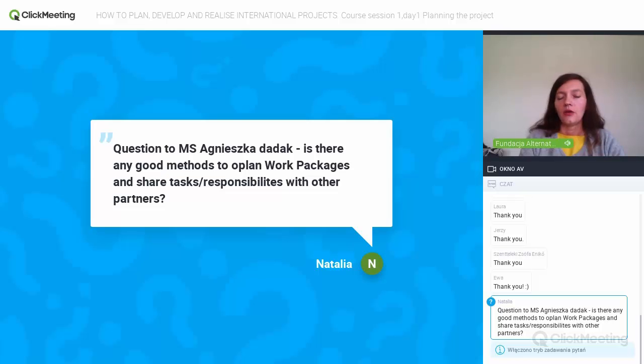And this is usually related to the work which needs to be done. So first of all, you have the objectives of the project. For each objective, to reach the objectives, you plan some activities to be done. So you just make a list of all the activities to be done, and then you put them into work packages. Usually, in the more elaborated project concept, there are work packages defined, and there is a proposal for each of the partners invited, which work packages are offered to you.